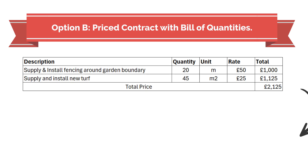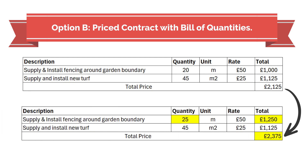However, unlike Option A, the price isn't fixed. The final price is based on a remeasure carried out at the end of a project or during the interim payment cycle. Payment is made based on actual measured quantities multiplied by the associated rate. So it's that simple, right? The contractor is paid for the measured work times the rate in the contract.